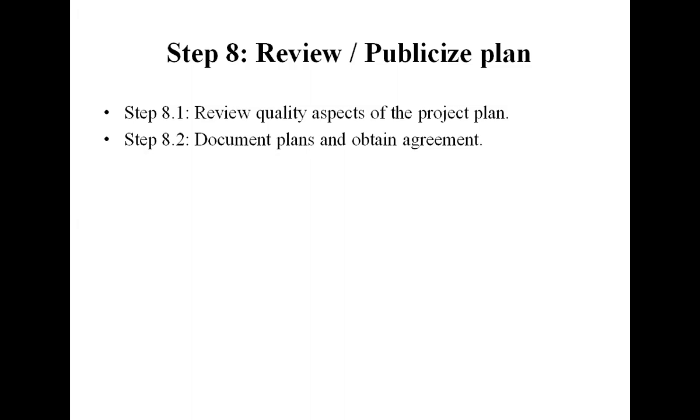Sometimes undertaking one activity can reveal that an earlier activity was not properly completed. We will have to rework that, which will require effort and resources for the earlier activity, and can also lead to loss of control of the project.